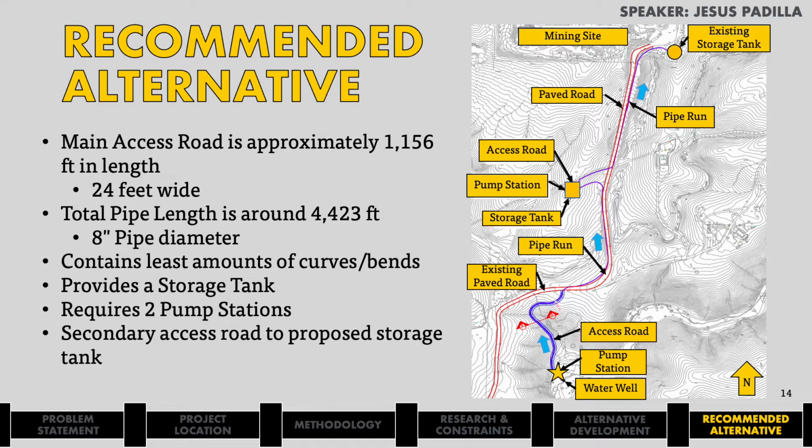Since the road is needed to reach the bottom of the creek and the pipe alignment will run underneath the road, we recommend to build this portion of the pipe alignment concurrently to save time and resources.